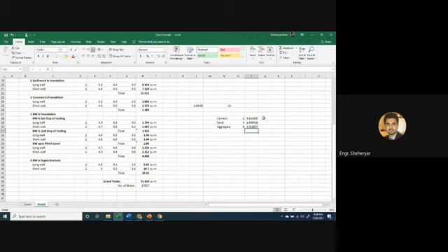Now if I want to convert this cement quantity into number of bags, the volume of one cement bag is 1.25 cubic feet. If we convert 1.25 cubic feet into cubic meters, we divide it by 3.24 raised to power 3. Yes sir. 0.03675. So this is the volume of cement bag in cubic meters.